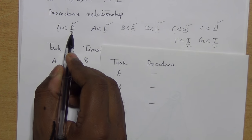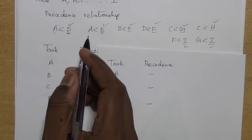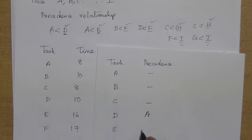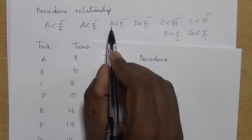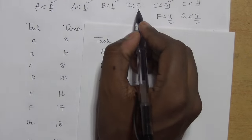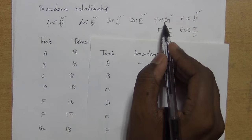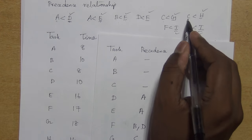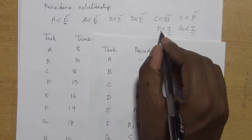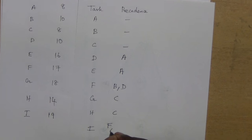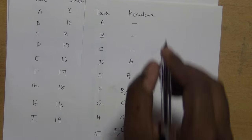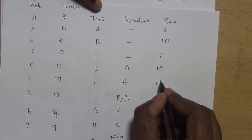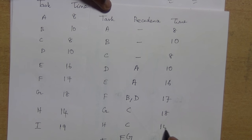But D is in the RHS and its predecessor is A, so we write A here. Similarly E is there, its predecessor is A. For F we have B and also D as predecessors. For G we have predecessor C. For H we have C, and for I we have F and G. The time values are: A=8, B=10, C=8, D=10, E=16, F=17, G=18, H=14, I=9.